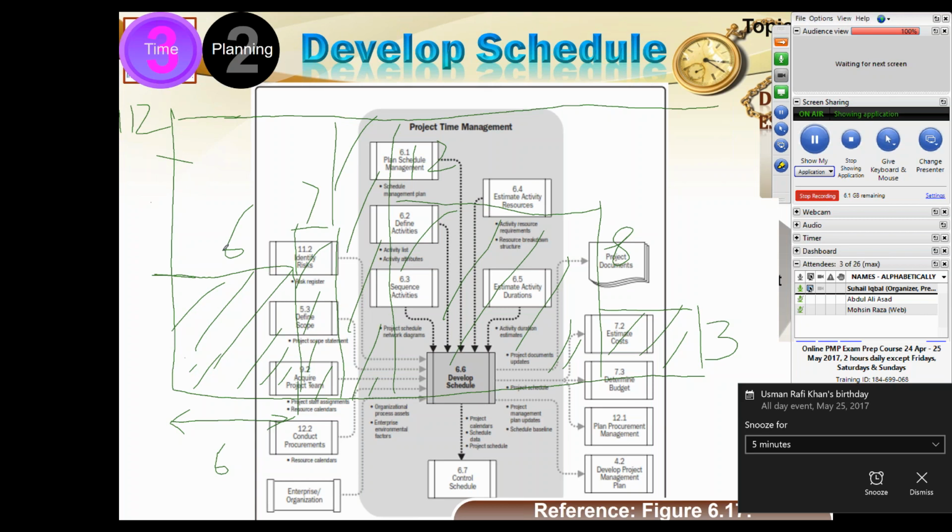And now you understand that the resource requirement would be very wild. Sometimes it is very high, sometimes it is very low. So you know that you have got 12 people to be used at maximum. What if I asked you to hire 12 people right from the beginning of the project and keep paying them for 18 days?